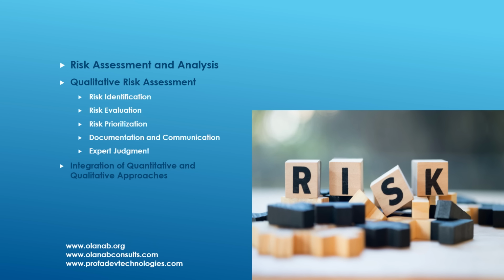The Delphi technique involves iterative rounds of anonymous feedback from a panel of experts to achieve consensus on risk assessments.